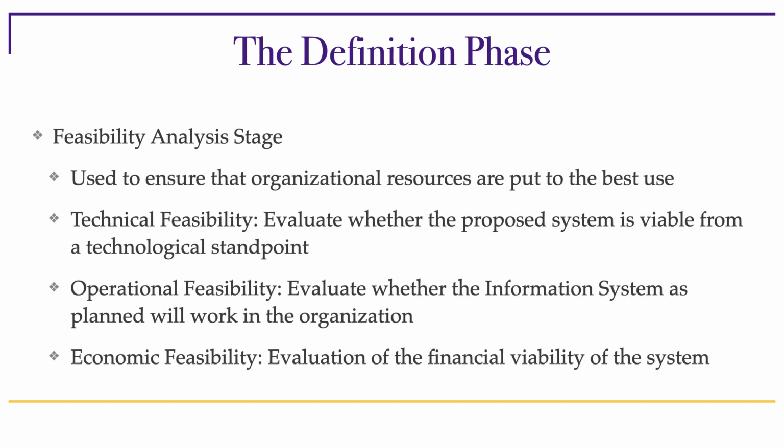So the next stage is the feasibility analysis stage. And this is a very important stage, because at the end of it, the project team will have to make a go or no go decision. In other words, this is a stage where you can decide to stop and not complete the project and not consider it a failure because you decided not to do it. If you take a go decision and the organization continues with the project, and you stop anywhere down the road, that would be a failure. You didn't finish the project.